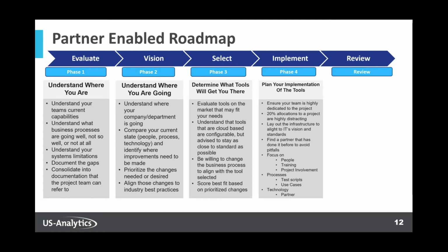That is usually a recipe for disaster when it comes to larger implementations of anything, including EPM, because they have their day jobs and they are constantly in conflict. It's very common during month-end close that all the SMEs go away and we don't have access to that subject matter expertise because they're all doing their day job.